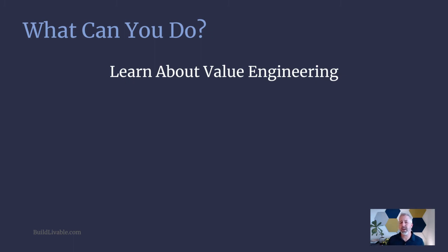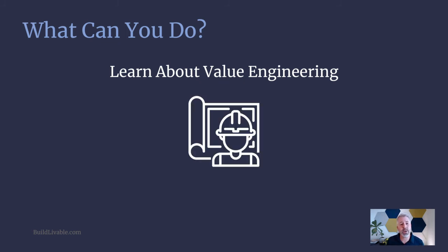So finally, we'll talk about value engineering. In building a custom home, your plans will be reviewed by a structural engineer, and their main focus is safety and making sure the home and the structure can survive the elements and be a safe home for you. That doesn't always include an element of the budget or cost that's required to do that. But there is something called value engineering, and if you bring that up, or if you work with your architect and structural engineer to say, I want value engineering, the engineer can use that perspective to develop the specifications with that in mind. So that's something to think about bringing up in your project.